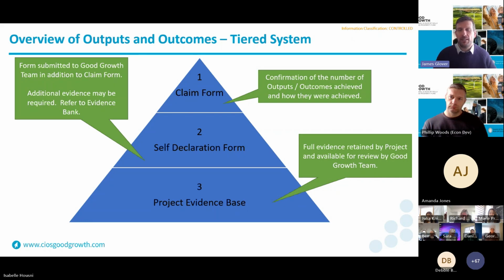And that'll be on a case-by-case basis. You'll also need to retain that evidence of outputs and outcomes, because you may be subject to a monitoring visit, and that can happen for a number of years. Even after project completion, that could happen for up to 7 years afterwards.